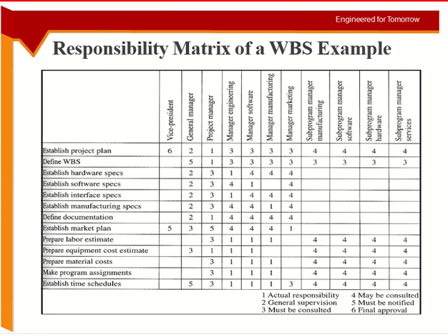This is for a manufacturing project or something. Okay, so you can see the roles are according to the company, not project based. The roles are organization based. Vice president, general manager. Yes, there's a project manager as well, but then there are the people who are already working in the organization. So there's no specific project team here. Client or something. And the roles are many, 6 instead of 4. Actual responsibility, who will supervise it. Who must be consulted, may be consulted, notification, approval.